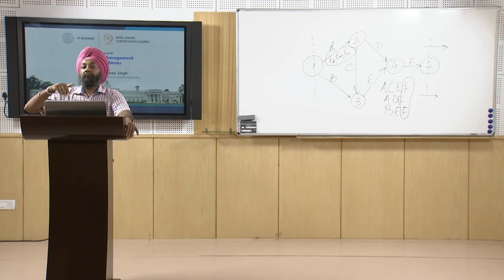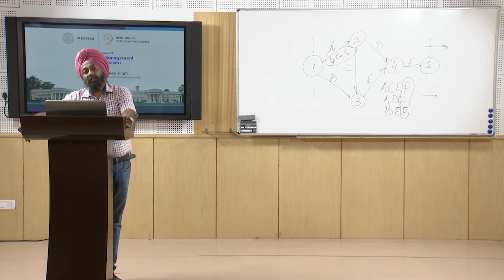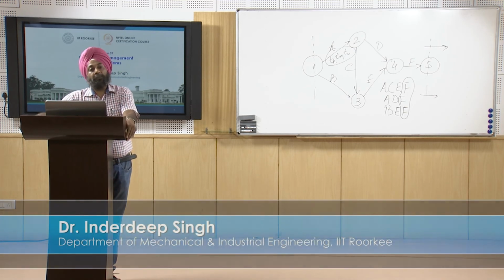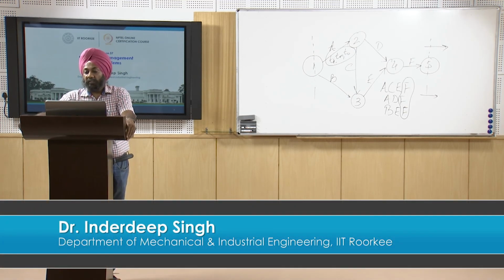When we give more time than the expected time, the probability of completion increases as x increases. In the last calculation, for x equal to 21 weeks, we saw the probability is approximately 90%, but here we see that if we spend one additional week, the probability increases to 95%.